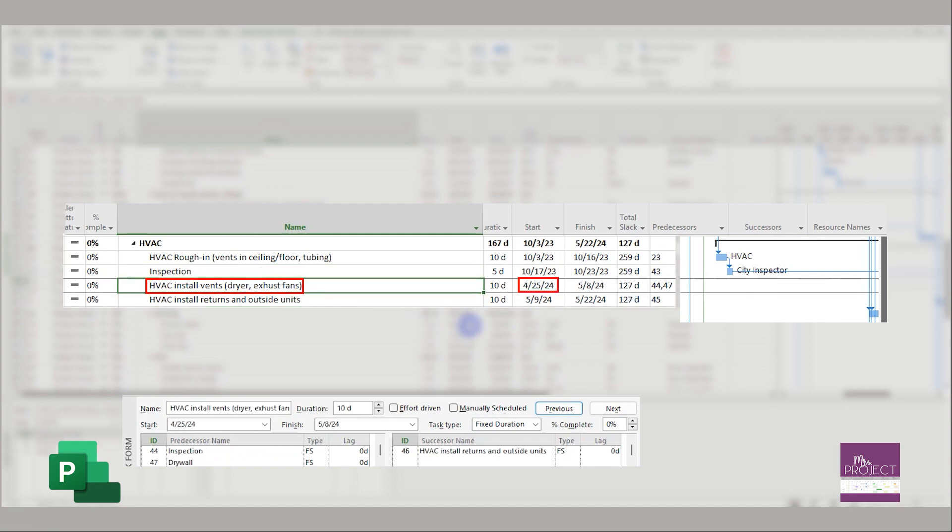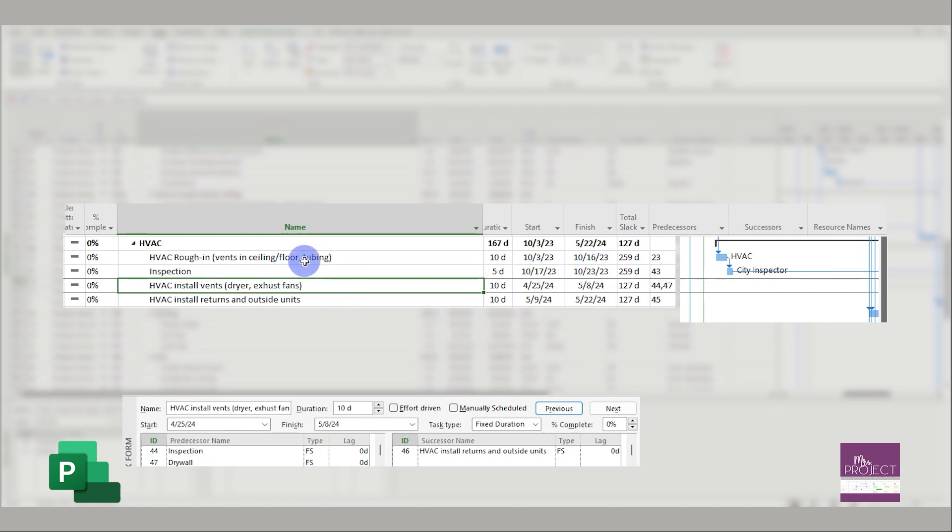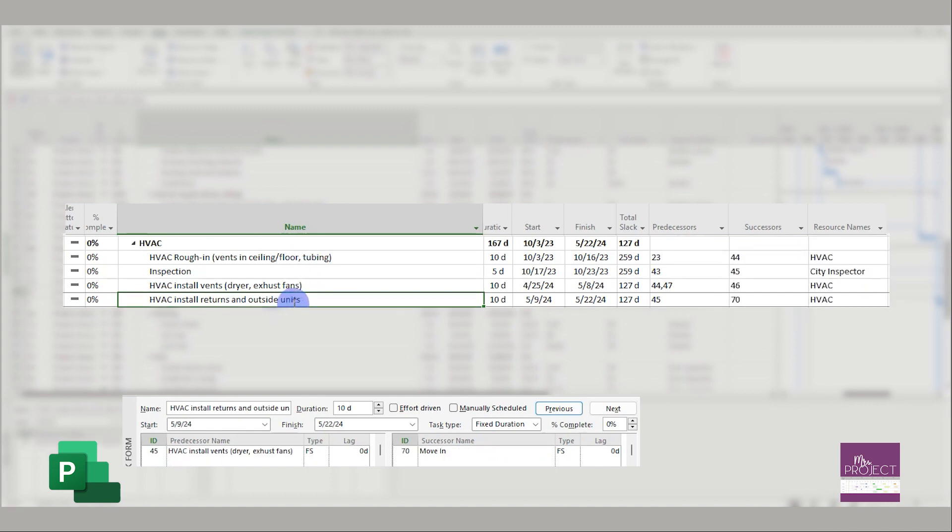So it makes me wonder: do I really have to start this soon? Is the relationship correct? Did I start too early, and is that really what the driver is? I don't know in this situation—does HVAC, is it required to be done by a certain time other than moving in? That's what I need to ask to say: is there a requirement to make sure that this task is done prior to this, or is it really that much slack? If so, it's okay if you do have that much slack.